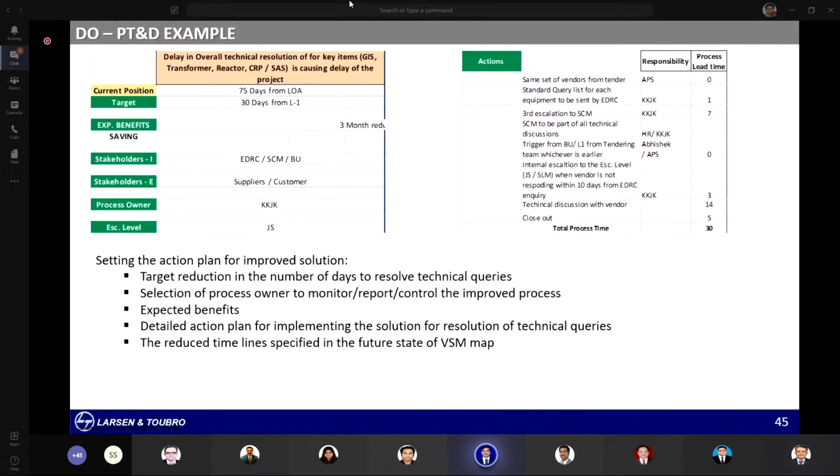On the second thing, if you allow me 2 minutes, I'd like to narrate what drove us to look at this initiative. Yeah, please take that. So basically, I am relating to Dr. Sriram's root cause analysis that he talked about. How we started is, in PT&D's context, most of our projects are not started on time. If we assume that our excavation at one of the substation sites would start in 2 or 3 months, we end up starting the project in 6 months' time.